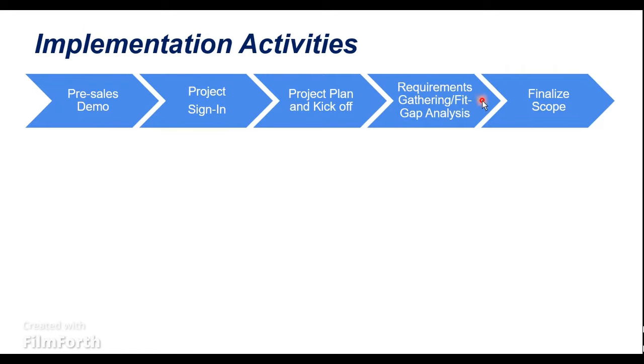or the requirement gathering. So the fit gap analysis in this particular stage, we are going to discuss with the customer by showing the available options in SAP and the best practices to be followed based on their business scenarios, and how can this be fit into their current business process. So if the existing functionalities that we have in SAP does not meet the customer requirements, only then we have to think about customizing the available functionalities in SAP.